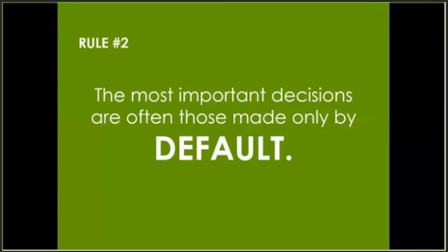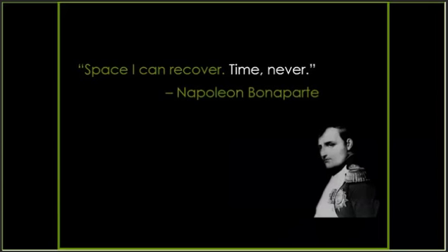But default decisions eliminate that subjective judgment by just having almost if-then statements, greater than, less than. Again, going back to that price list of if it's less than $350, no decision needs to be made besides getting the work done and moving forward. Space I can recover, time never. This quote is a reminder that once time is gone, you can't get it back. Default decisions increase the amount of time you can give to a project.